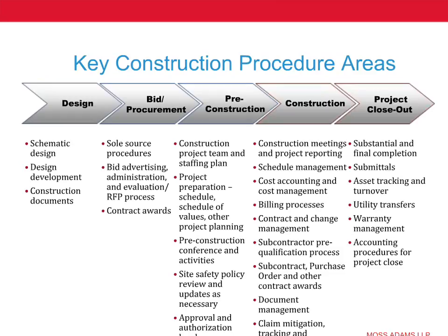Sounds good. So starting with the design phase, we've got schematic design, design development, construction documents. So using that one example of DBE compliance, it turns out right in the design phase there's a requirement related to DBE compliance that the construction documents be constructed in a way so that you can identify the portions thereof that you could sub out to a DBE.